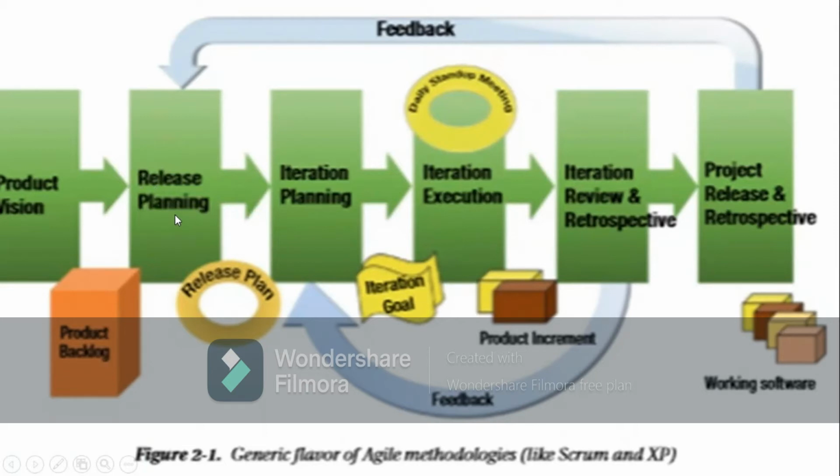So the whole process takes 8 hours. 4 hours, the product owner explains what needs to be done and explains the high-level features, and the next 4 hours the team just performs their estimation. So we place them into a sprint backlog, or we call it a release plan. And then once the iteration planning has been performed, it goes into execution, right?